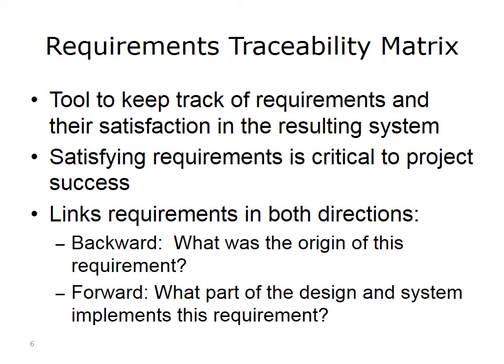Finally, what are the test scenarios that directly test whether this requirement is being satisfied or not? What are the names of the test scenarios that will test for this? Again, requirement satisfaction is a major determinant of the acceptability of any resulting systems or services from your project. It can be very important for you as a project manager to have this traceability matrix handy. You will have to balance whether traceability is at a level of detail that is effective and not excessively burdensome in your project.